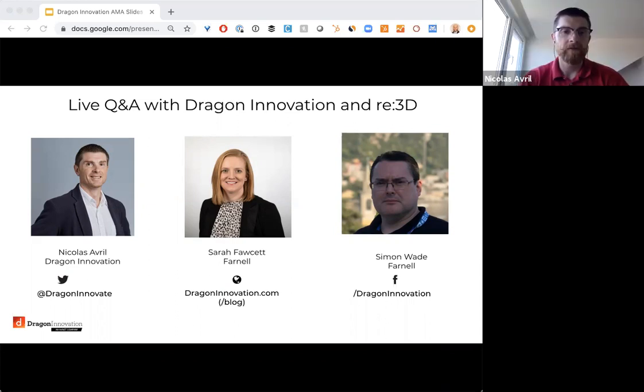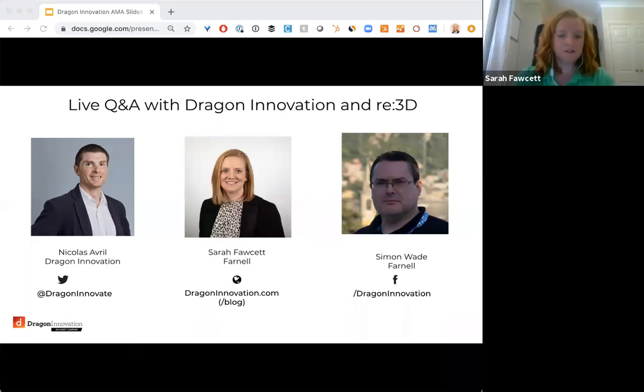Sorry, you want to go? Yeah, sure. So super small batch quantities are available through high service distribution. Often high service distributors like Farnell or even Avnet will have BOM quoting tools where people can upload their bill of materials, and then we would get back to you with a quote, cost and lead time. Often these components are available in very small quantities, in single units rather than full reel or full trays, and being a customer of Farnell or Avnet, you're then part of the ecosystem, where if customers move from small quantities to higher quantities, you can take advantage of the full Avnet supply chain.